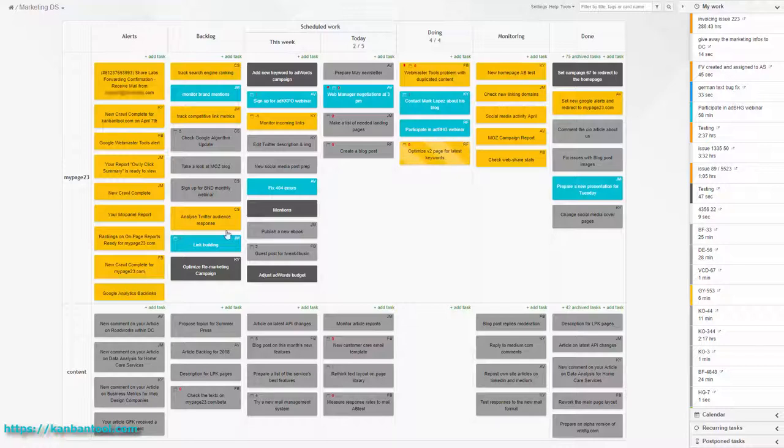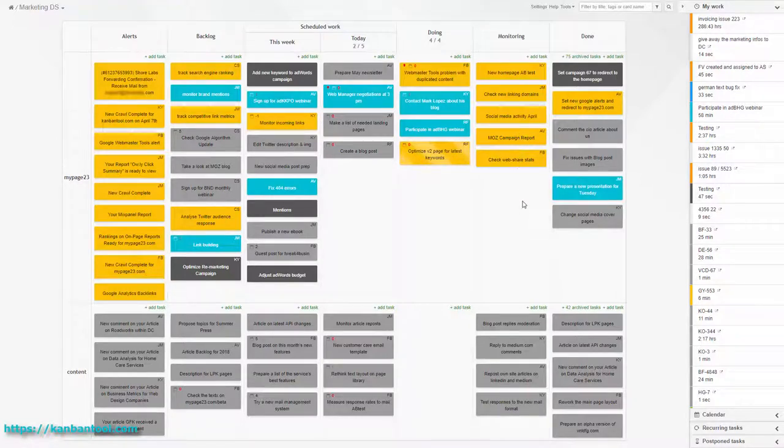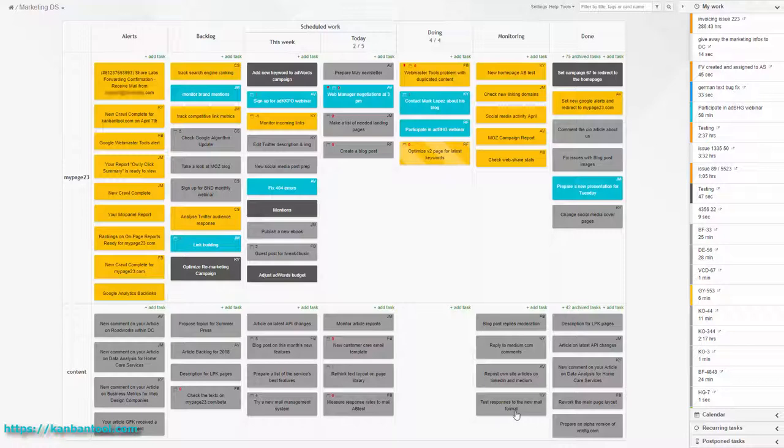Marketing tends to involve a lot of testing and experimentation. So every task that was a try of a new approach or a start of an A-B test is moved to the monitoring column with a due date for when to first check the test results.